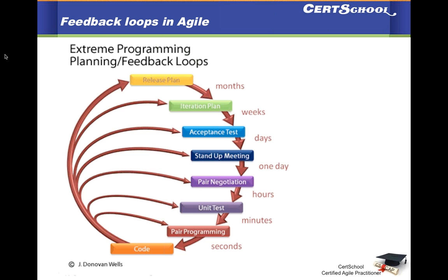One thing in my experience: I was doing an agile transformation for one of the enterprises, and I realized that one thing I suggested which worked very well for them pertaining to pair programming is to deploy pair programming for critical stories. If you don't have resources, time, or a plan to deploy pair programming for everything, try to deploy it for critical stories which have framework level changes, things that are complex, things that can cause severe damage. Try to deploy pair programming at least for that. That is a wonderful suggestion.